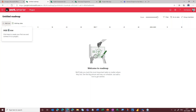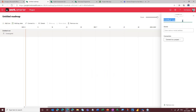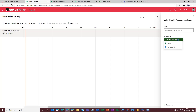So step number one — I'm going to add a row and give it a title. I'm going to call this the Coho Health Assessment Project because that's the project I'm going to link to. And then I'm going to connect through to my project. I've got a couple of options here: I can either connect to a project that's in Project Online, Project for the Web, or to Azure Boards. So we will click on Project first.